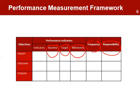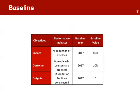This is the tool that the project will use to manage, monitor, and evaluate its performance. Note that this framework does not include activities. The baseline is the value of the indicator taken before the start of the project. These values act as reference points against which progress of the project can be measured. The information on baseline can include the date the baseline values were obtained, and this will help determine the performance of the project over time.